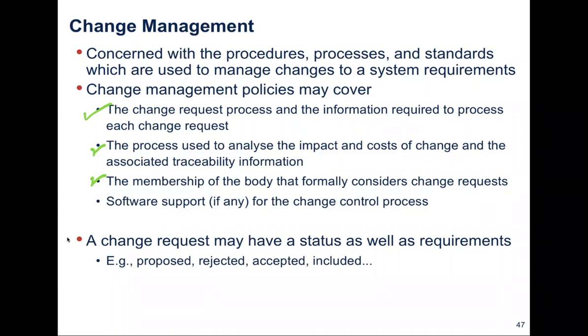So if we do have a change request, it may have a status as well as requirement. A change request could be proposed, or the change request has been rejected, or maybe the request for such a change has been accepted, or the change request may be included. So similarly to requirement status that we talked about before, we could also have a status for a change.